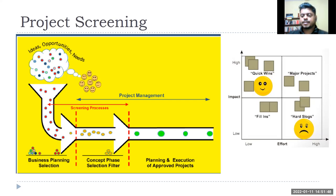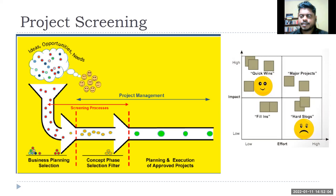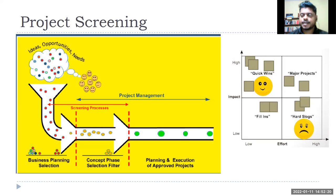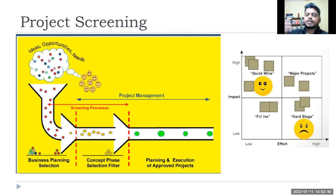For a complex project like product development, you might have to create a business case showing that a project costing 10 crores over two years will generate certain revenue and profit in the next five years. Without that, nobody is going to approve your project. Different companies have different rules about when a business case is required — sometimes even for a 5 lakh investment a business case is mandatory.